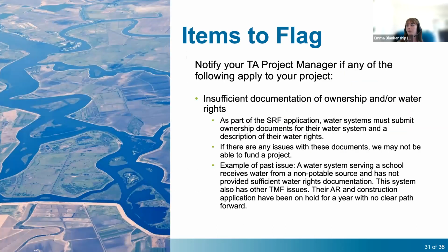Also, we want to point out documentation of ownership and water rights are requirements for the SRF application. So they must submit the ownership documents for their water system and a description of their water rights. If there's any issues with these documents, then we might not be able to fund the project.